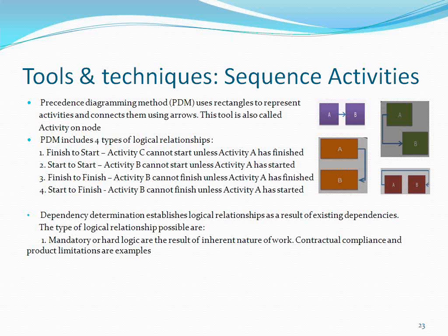Right? Start to start. Start to start is a successor activity cannot start until the predecessor activity has started. For example, you are writing a book. You have to start that activity if I have to look for grammatical mistakes. If you finish the first page, then I will start looking for the grammatical errors. Proofreading, I will do it. If you don't start the book, I can never start that proofreading.